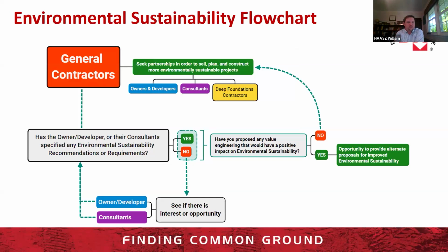Then we get to general contractors, right? And it's the same sort of logic. Has the owner, developer, or their consultant specified any environmental sustainability recommendations or requirements? And if the answer is yes, then you proceed as normal, right? And then you ask yourself, well, have you proposed any value engineering that would have a positive impact on environmental sustainability, right? And if the answer is yes, then you have the opportunity there to provide alternate proposals for improved environmental sustainability.